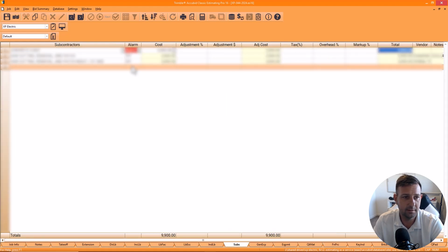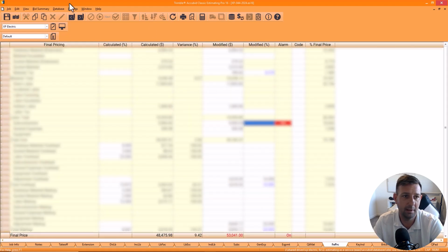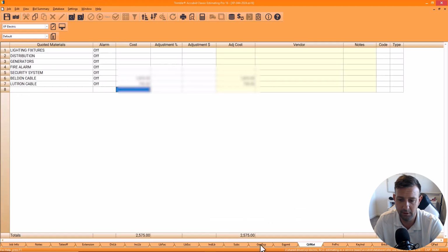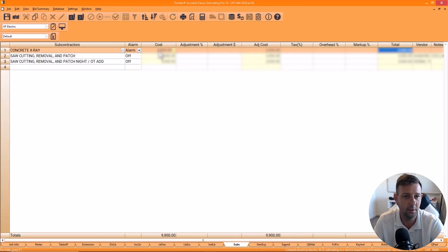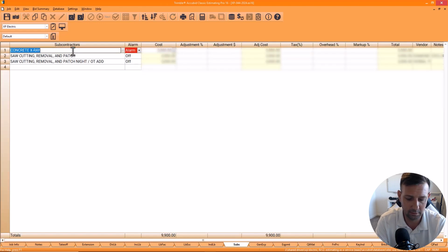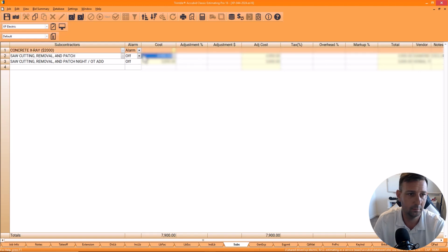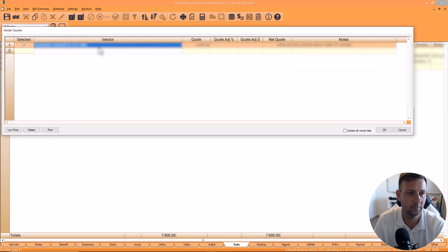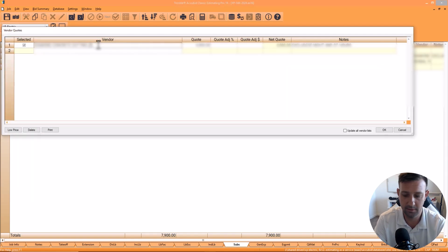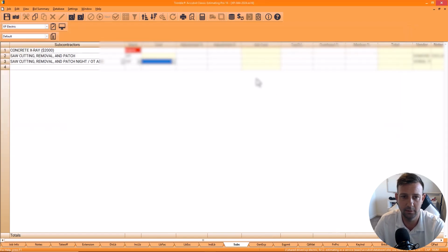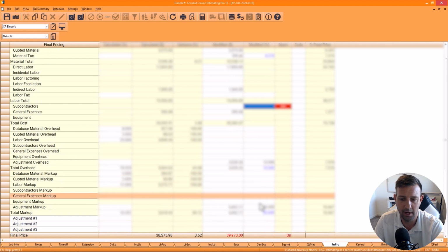That is higher than my bid limit. So what I'm going to have to do is exclude. Here's what we're going to do. We're going to exclude x-ray. We're going to exclude. So I'm just going to write these numbers in so that I can remember what they were. And then we'll just exclude those values. Then that should bring the number down pretty good.